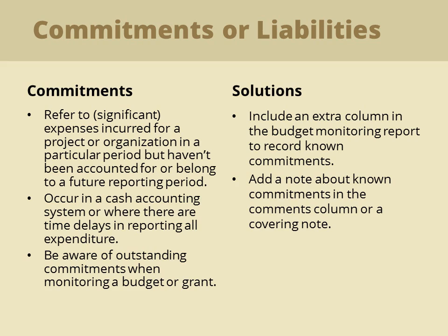Include an extra column in the budget monitoring report to record known commitments. Add a note about known commitments in the comments column or a covering note.